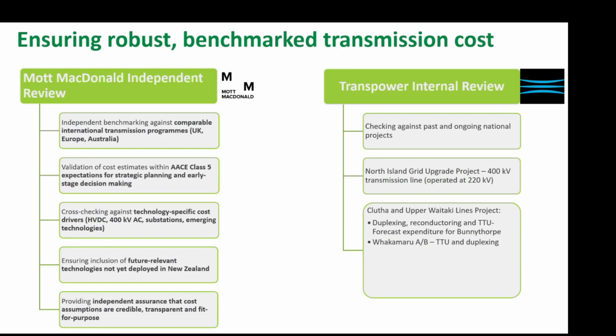So as I said, we've got lots of data on some parts of the model or components of the model, and we've used that where possible. We turn that into gross unit rates, so at a per kilometre level, for example, for transmission lines. But we did identify that we had limited data, as Cam mentioned, not frequently building long new transmission lines.